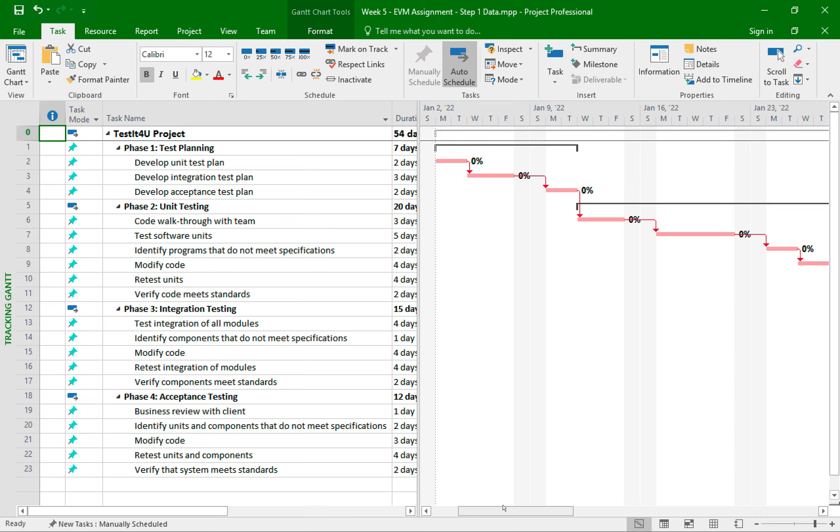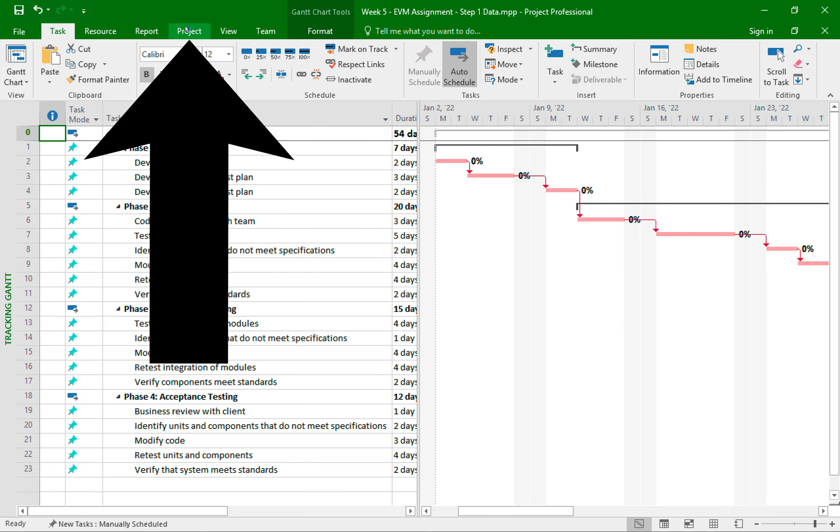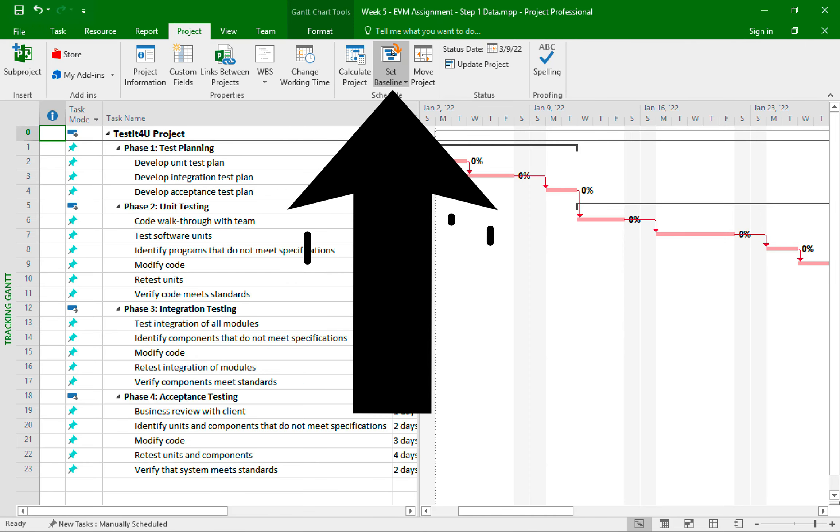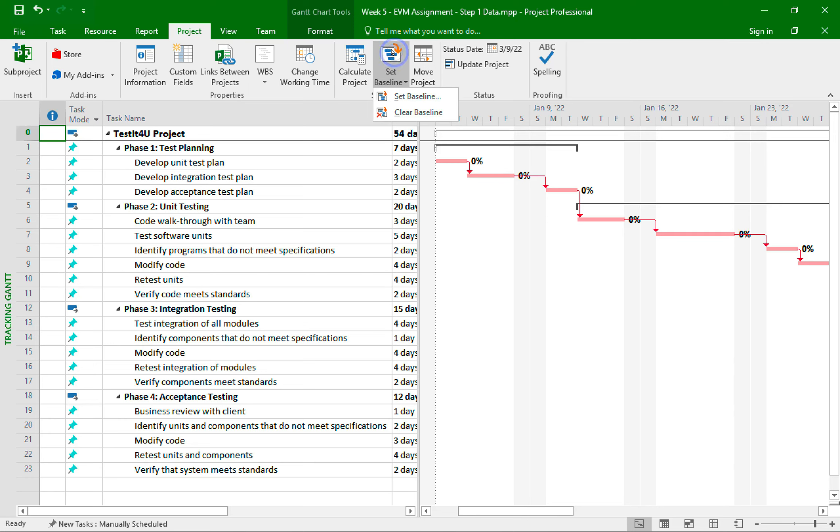For example, I will set a baseline now on the project since I entered all this estimated data. Then I will compare this estimated data against the updated information that is provided for us in step number two. So to set a baseline, I need to click on the project tab, then click on set baseline, then on set baseline again.